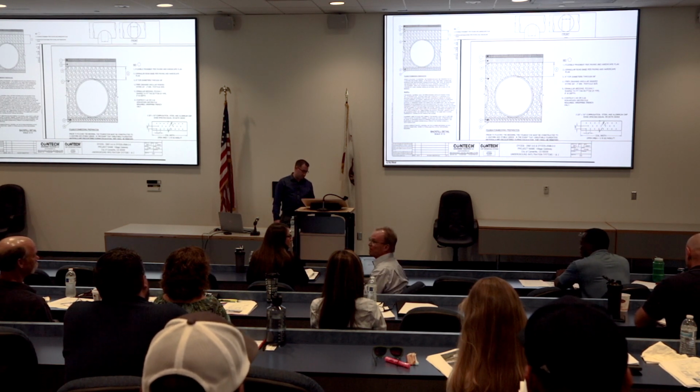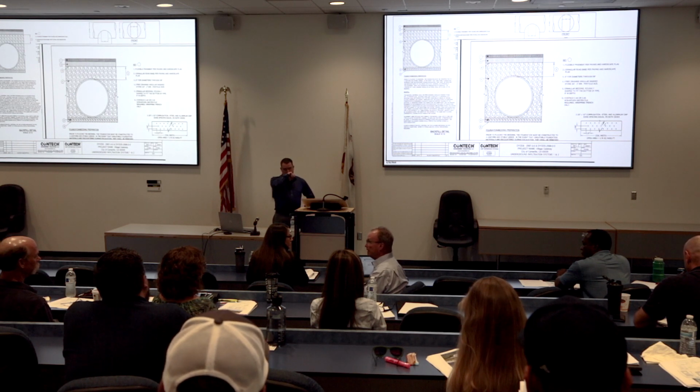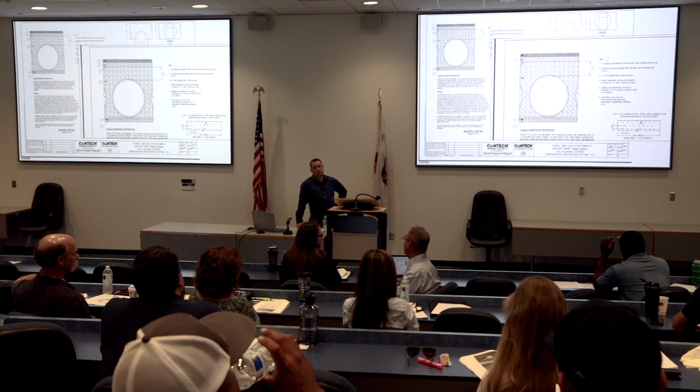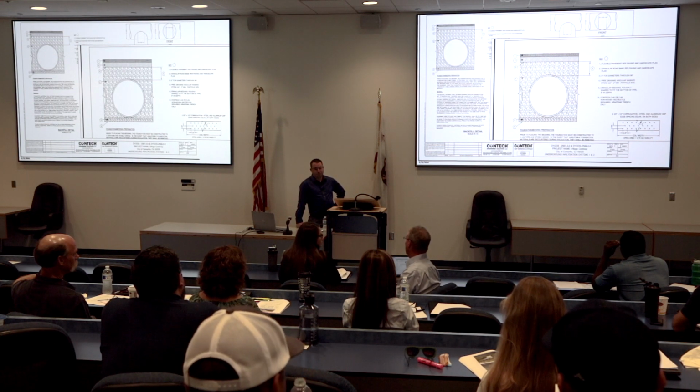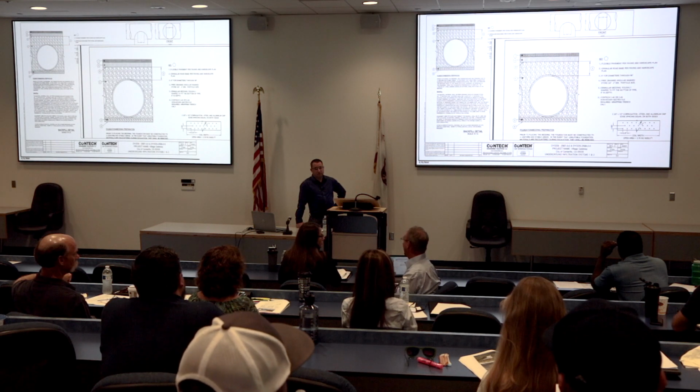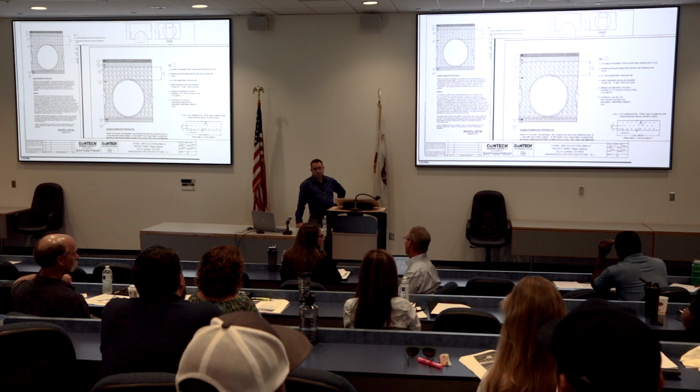And B, this is why we give drawings to the contractor for submittal and approval before the manufacturing process starts. Because you saw a problem and said we have to deal with the problem, and it got dealt with. But some people don't. It's just a quick sign-off and they go. So it's definitely important. It should be well considered.